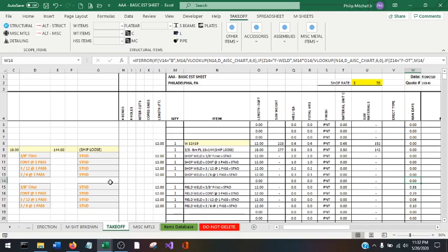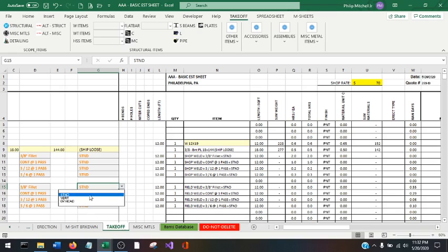And another issue with welding is whether the guy is standing and the weld is at shoulder height to waist height, or is it overhead? Vertical is double. Yep, double. Or if it's overhead, it's even like quadruple or something. Yeah, 2 hours, or two man days.